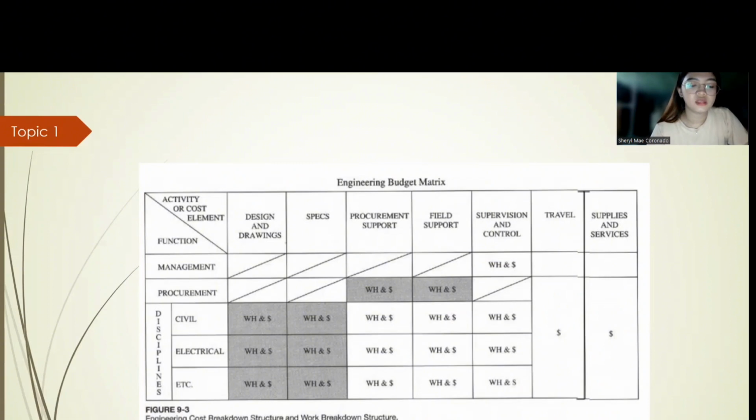The detailed WBS would be expanded from these budget items into areas, systems, and subsystems that define the total project. For example, the deliverable to be produced by the electrical discipline would be a drawing list that included all drawings for electrical work. The number of work hours for each drawing and the number of work hours of calculations that are required to produce the drawings would represent the budget.